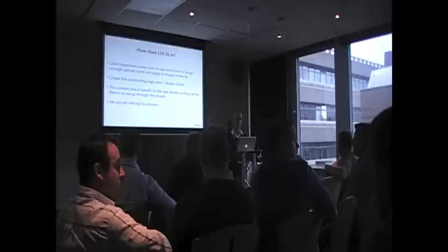But effectively, you slice through the cake, and you choose a piece that you can get done in the amount of time that you have. And so effectively, they shouldn't strictly be dependent on each other. They should be self-contained units, and dependencies should be minimised at all possibilities, really. Because if you're getting dependencies, it means you're probably cutting your cake the wrong way, and you're probably doing things in the old way, doing a bit of development and a bit of UX and a bit of.